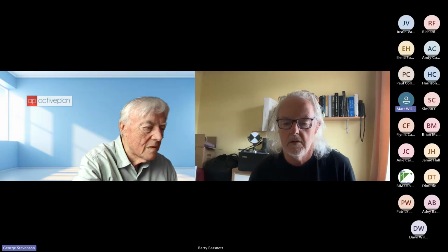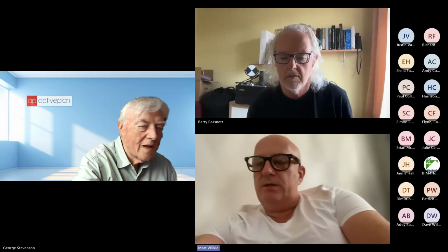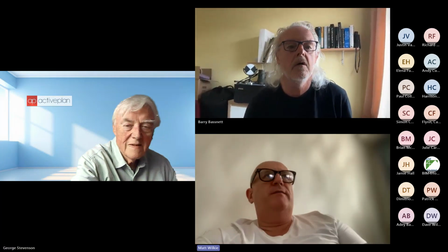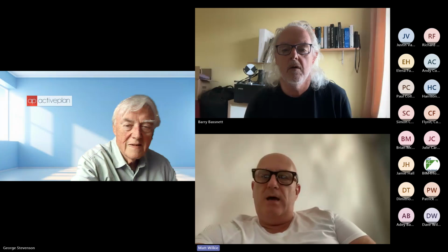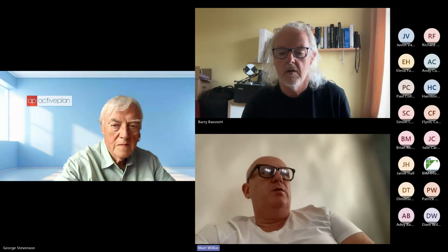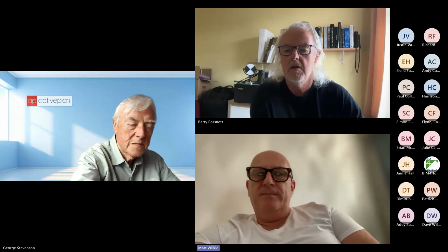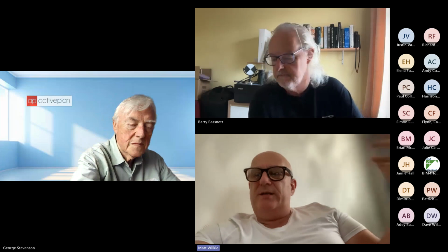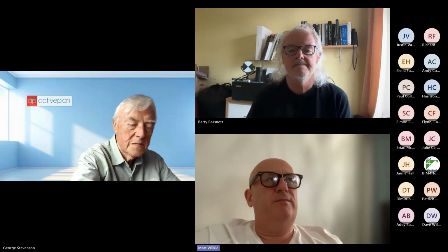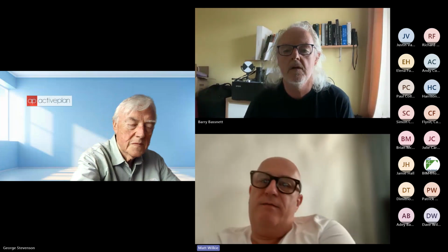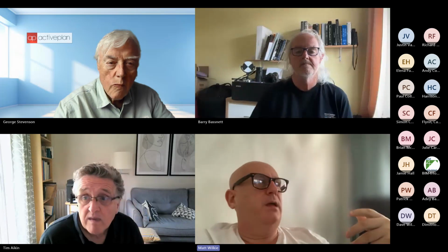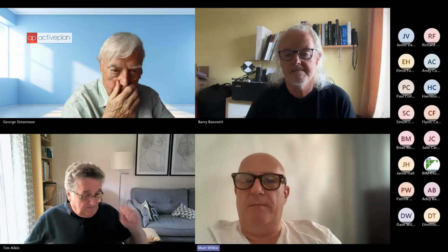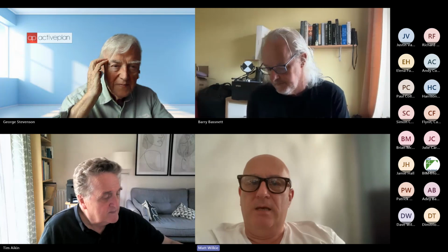Hi, George. It's Matt. Just a quick one for me. I think it's important for PFI PPP handbacks because it's also about the time stamping. So actually having the 360 there is very useful for when you actually want to validate, in the sense of you may have some legacy issues. You may have things like the RDS doesn't match. It may be the case of fire stopping. It may be the case of checking above ceilings and evidence in it.